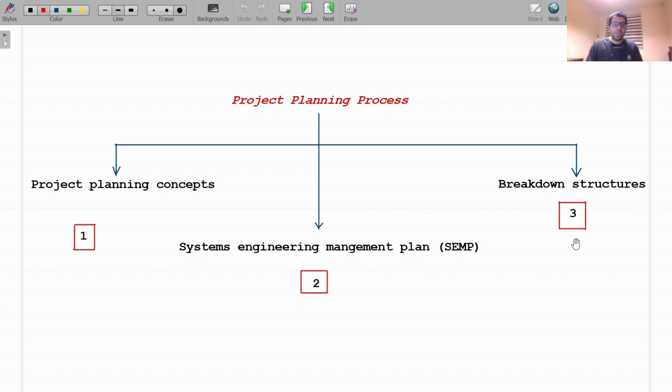The work to be carried out to reach the project objectives can be organized in a breakdown structure as a hierarchical tree where the lower level activities provide more details. This is the work breakdown structure or WBS, which is based on the FBS in the initial stages of system maturity, for example, feasibility, conceptual design, and the PBS in the later stages.